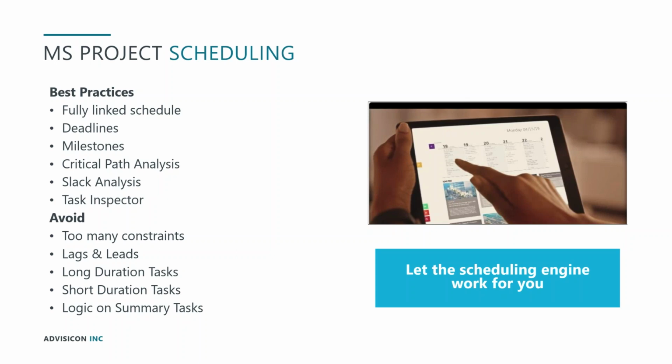To get the most benefit out of Microsoft Project and its ability to describe or deliver on a dynamic project schedule, we want our detailed tasks to be linked to each other. We want our resources to be assigned to the detailed tasks, and we want the summary tasks to provide the aggregation that helps us to recognize structure in our project schedule.